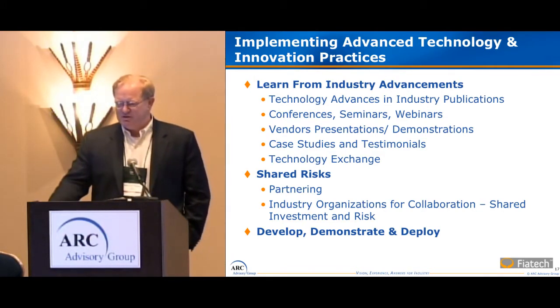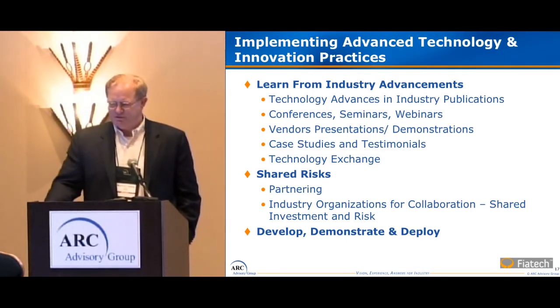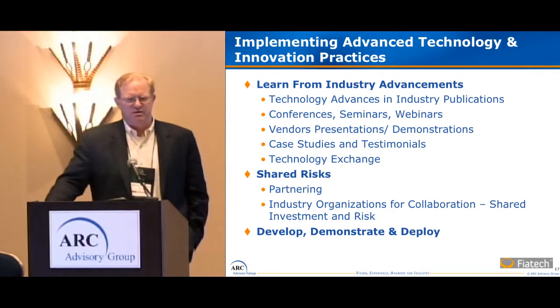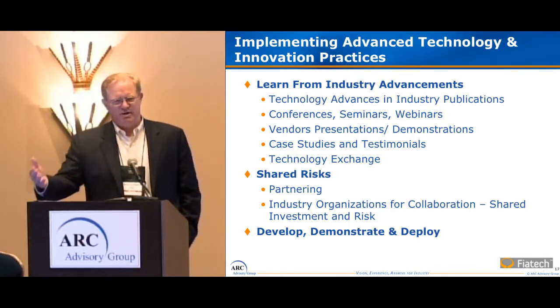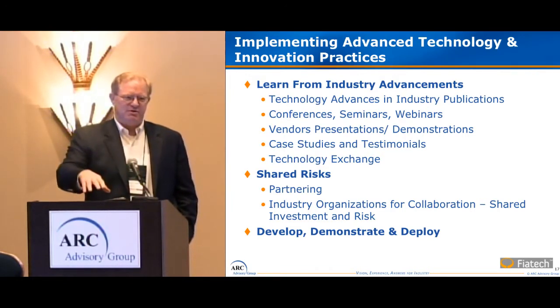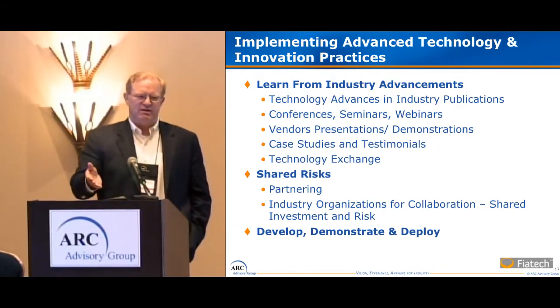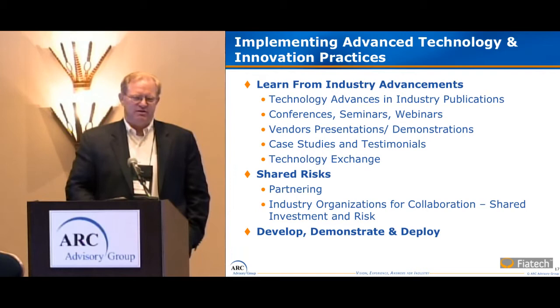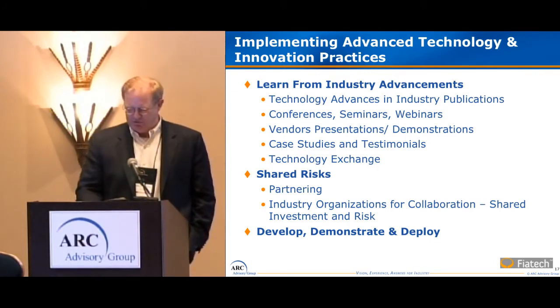So there's technology advances in industry publications, conferences, seminars, vendors, suppliers, presentations, case studies and testimonials, and then there's technology exchange that can occur in a variety of ways. And then there's ways to share the risk, to do it in partnering and in industry organizations that drive collaboration. And we strongly promote a develop, demonstrate, and deploy. So take technology that's emerging in innovative practices, gather together stakeholders, do some further development, and go get it demonstrated. So before you take a new technology out in a full risk environment where your project's got significant performance at stake, go do some proof of concept and demonstration with others, leverage that with other participants so you share the risk and cost and see that it works and implements before you're over-invested in it.